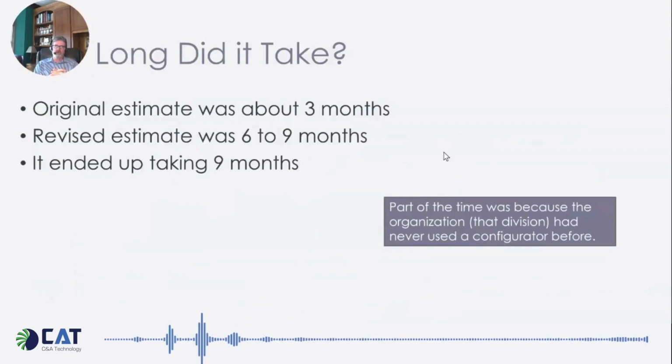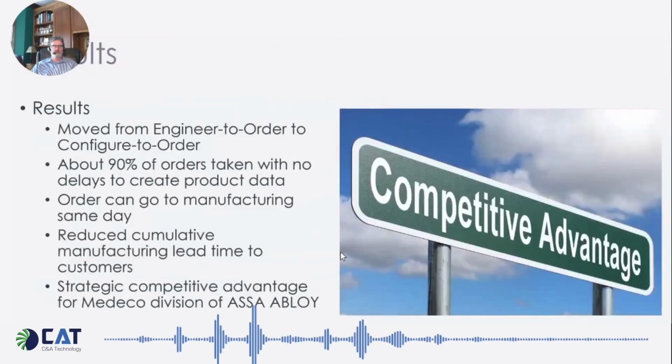So we actually beat the estimate on that. But the client had experience with a configurator. They had one that was being used every day, so it was more moving and migrating. We couldn't convert it mechanically, but we were able to set it up pretty quick. So it doesn't always take longer than you think. It depends on the situation.